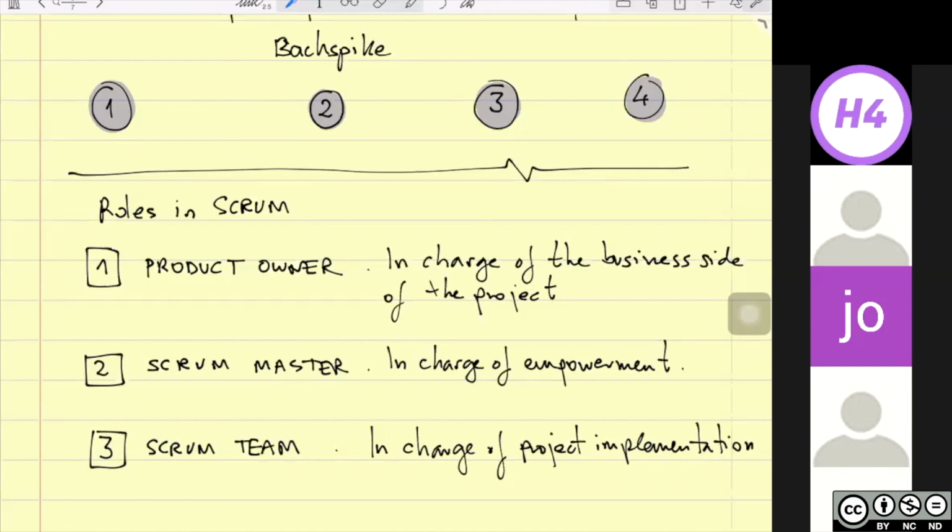So ideally, it is a small cross-functional team consisting of about 6 people, plus minus 3, okay? So it can be 3 or it can be 9. Ideally, it is a small cross-functional team, including business analysts, product testers, and developers. Just to name a few examples, okay? So they're professionals, self-organizing, cross-functional, interfaces with the PO, with the product owner, and 6 plus minus 3 members. Okay?